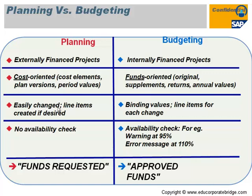The availability check defines how much percentage or tolerance unit is required. For example, at 80% a warning message triggers, at 90% a mail is sent to the appropriate person, and at 100% the system throws an error message. Planning is called a fund request and budgeting is called approved funds.